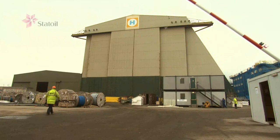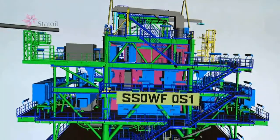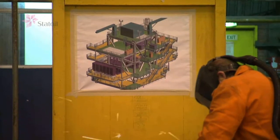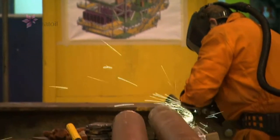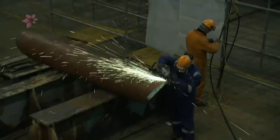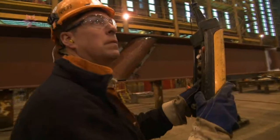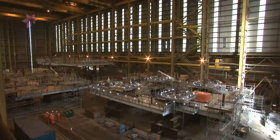And while all this work is going on in Norfolk, miles away in Hartlepool, work is ongoing on the 2 1,000-tonne offshore substations for the wind farm. Offshore construction specialist Harima is making 2 topsides, safeguarding jobs at its Hartlepool facility, which employs around 1,000 people. They're scheduled to sail out later this year for installation early in 2011.